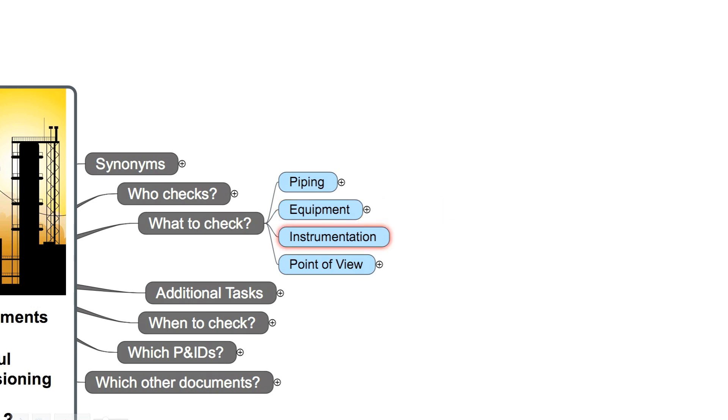All the instrumentation has to be checked. Usually this will be done together with an instrumentation engineer. You as a commissioning engineer verify the basics like nameplate, flow direction, mounting position, temperature range, and measurement range.